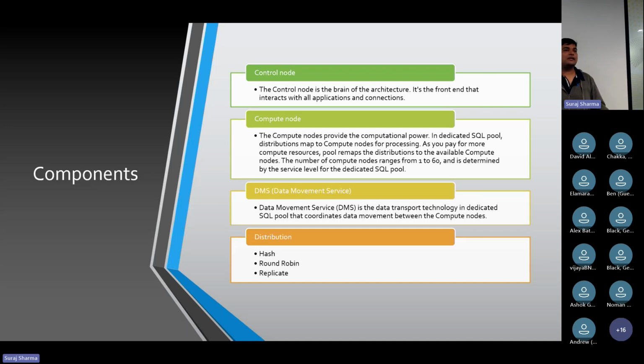The delta loads are taking a similar amount of time. If you have daily delta loads running in your company, in my old system it's running close to 4.5 hours. So my success criterion to migrate to Synapse is that the delta load, which is running on hyperscale in 4 to 4.5 hours, should work on Synapse in either 4.5 hours or less. If it is going more, then we are not moving to Synapse.